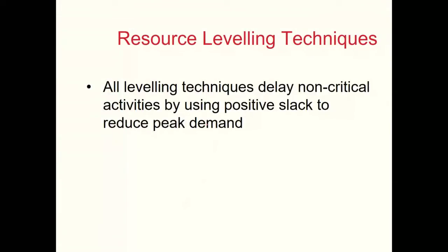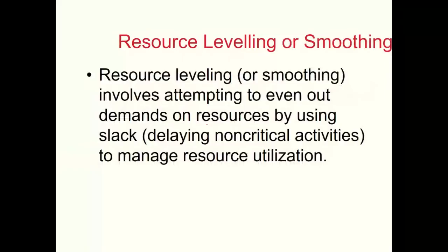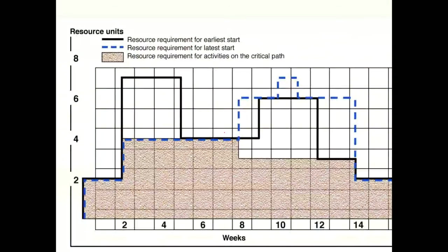Now, when we talk about resource leveling techniques, delay non-critical activities by using the positive slack to reduce the peak demand. We fill in the values for the resources. And resource leveling or smoothing involves attempting to even out demands on resources by using slack, which involves delaying the non-critical activities to manage resource utilization.